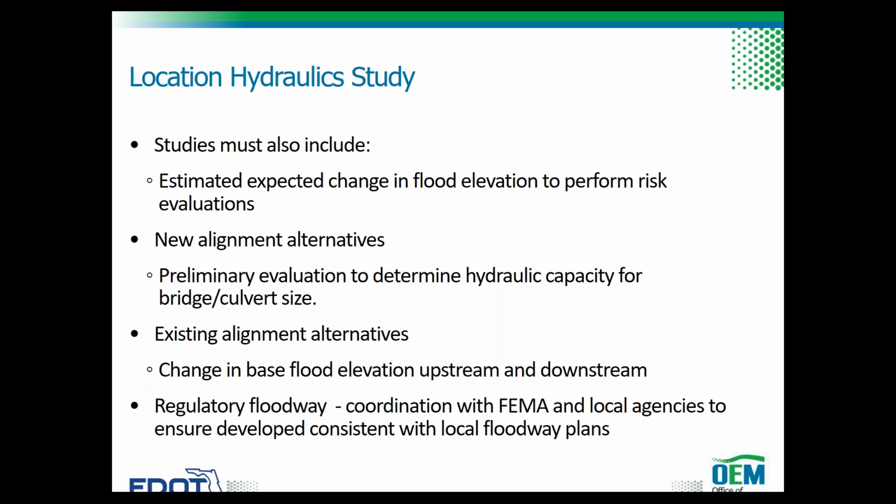If the hydraulic evaluation shows that the flood elevations will increase either upstream or downstream, a location hydraulic study must be performed on the area impacted to evaluate the potential for flood impacts. The location hydraulic study should model the floodplain and size the proposed bridges and culvert structures appropriately. The model needs to identify the downstream constraint, or the tailwater limitation, that is affecting the floodplain stage and limits within the project.